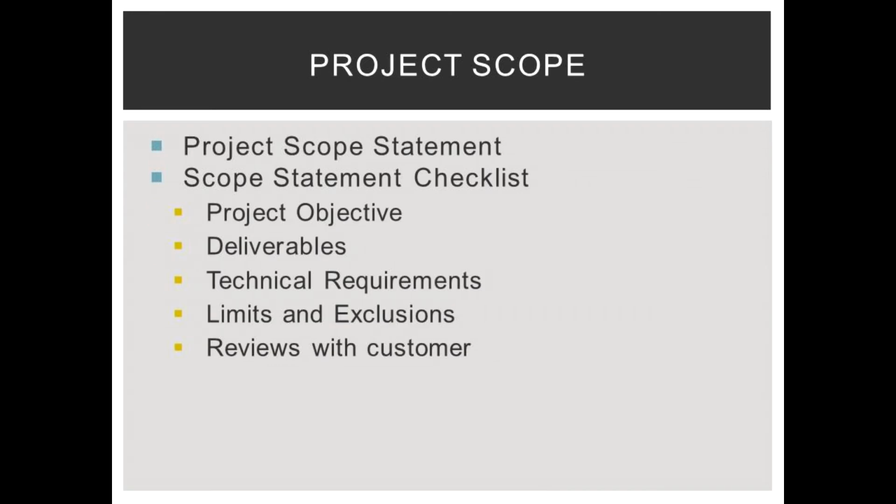The goal and objective of this software project is to develop an application to schedule meeting rooms and meeting room equipment for 160 users over 4 locations. The initial project plan allows for software to be completed and delivered within 30 weeks. Within these 30 weeks, our team will deliver 4 project prototypes and a final design, along with requirements, specifications, and a design document for each prototype. We will also deliver a risk analysis plan and a user manual.